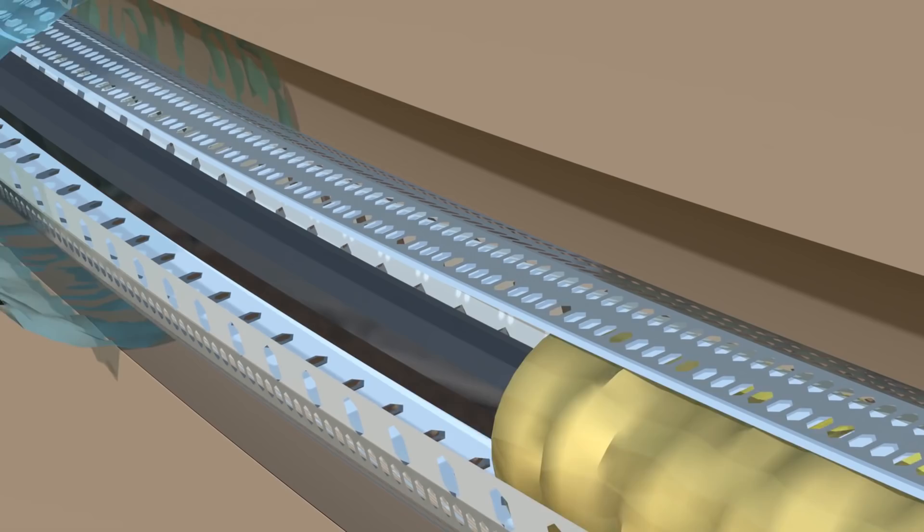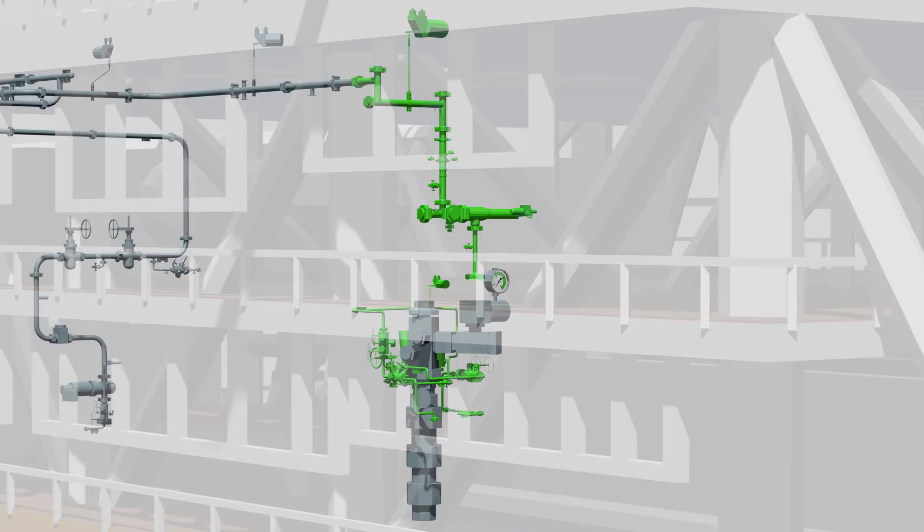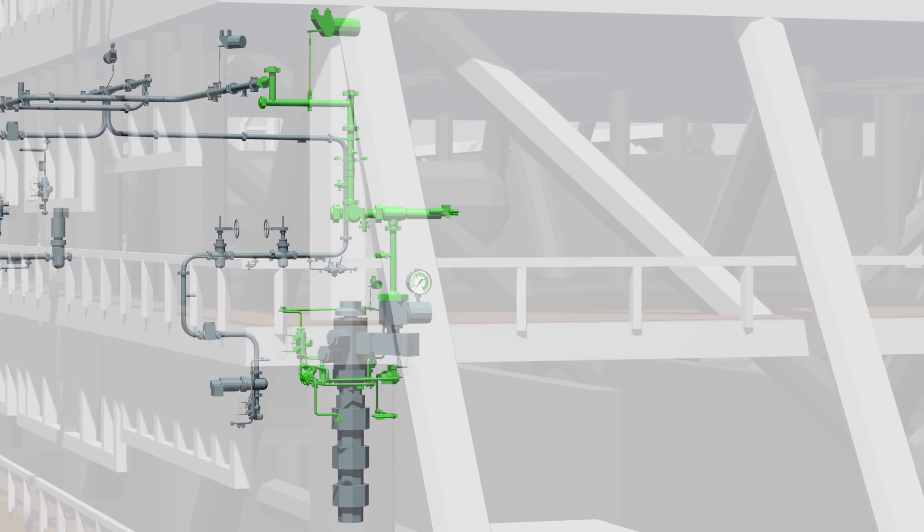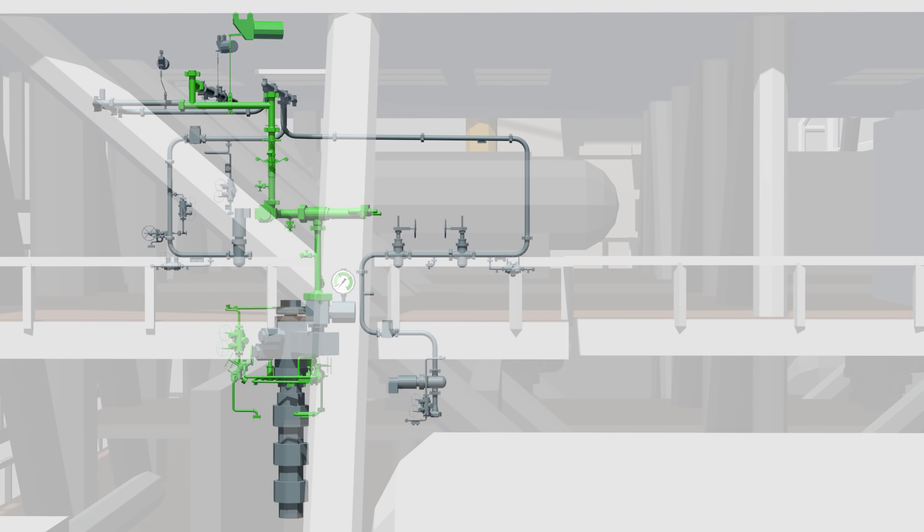With the well complete, we could install the Christmas tree and begin hookup and commissioning, using an innovative process called 3D SimUps, which allowed hookup and commissioning activities to progress simultaneously. This meant we completed ahead of schedule with zero unplanned delays. SimUps combined with the simplified flowline design led to a new UK hookup and commissioning record for a high-pressure, high-temperature well.